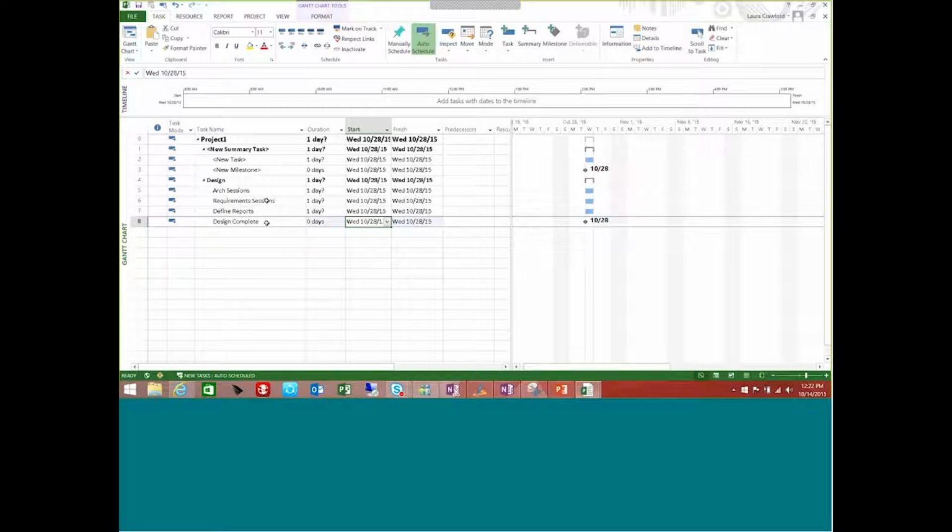So you can see here that I have a little bit of my work breakdown structure created. All right, again, I have my deliverable up here. I also have the detailed tasks or the things that need to happen in order for me to complete this deliverable. Best practice is to go ahead and insert milestones into your project plan too, to mark the end of the deliverable. This will be important when we get into the next step and we're actually talking about predecessors and defining dependencies here.